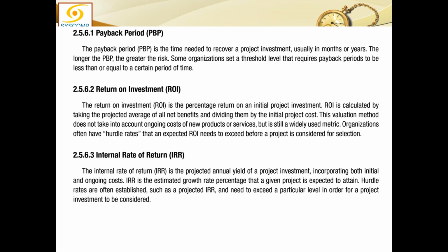And if it is zero, then there is no fun in doing this business. I put this much money into it and I get exactly the same amount of money back. So why did I put in so much effort to get zero? So this is also not feasible. Anything zero or less than zero is not feasible, and anything positive is feasible. That is as far as the feasibility goes.